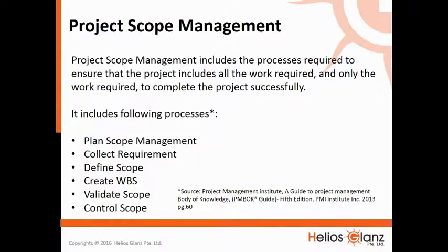Project Scope Management includes the processes required to ensure that the project includes all the work required and only the work required to complete the project successfully. It includes following processes: plan scope management, collect requirement, define scope, create WBS, validate scope, and control scope.